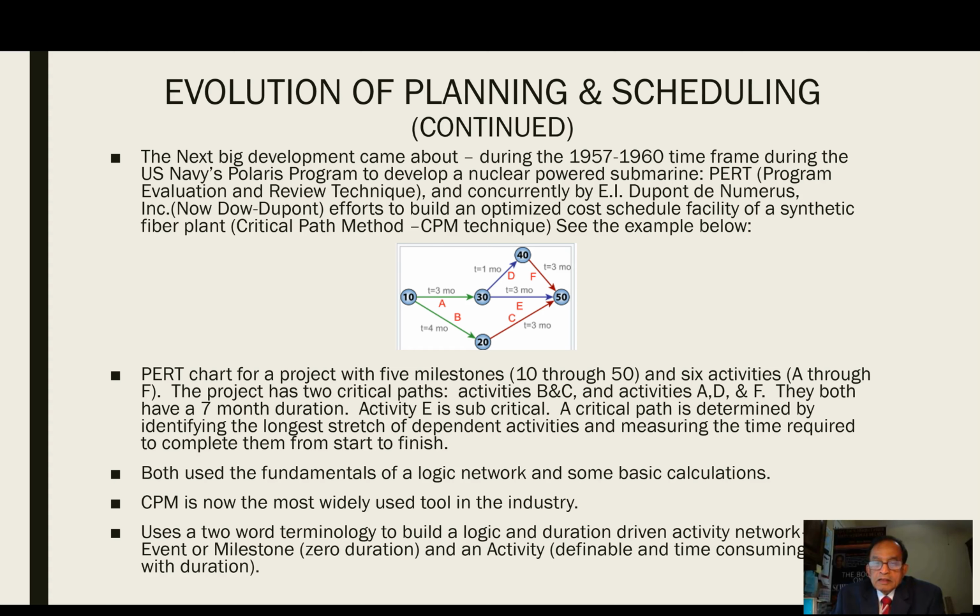Activity E is subcritical. A critical path is determined by identifying the longest stretch of dependent activities and measuring the time required to complete them from start to finish.